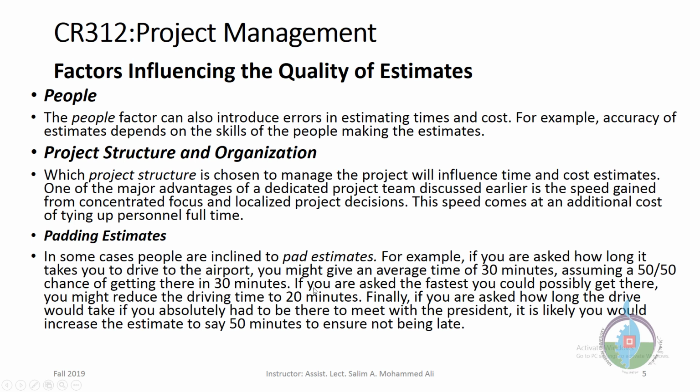If you are asked what is the fastest you could possibly get there, you may reduce the driving time to 20 minutes. Suppose that it is Friday, no traffic is going on, so you will make it in 20 minutes. Finally, if you are asked how long the drive would take if you absolutely had to be there to have a meeting with an important person, say the president, it's likely you would increase the estimate to say 50 minutes, because you are not going to be late in this meeting.